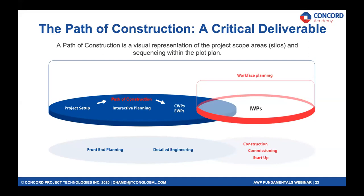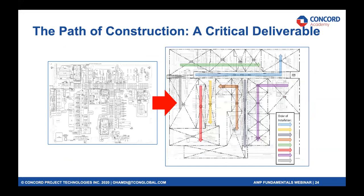The timing for defining this deliverable early on is in FEED. If you are a discipline or EPC contractor who got on board after the FEED package was complete, it's not too late as long as you haven't started detailed engineering. The bidding stage is also a good opportunity to develop a path of construction. Here is a visual of a component of the path of construction — its breakdown of areas where you take your plot plan, divide it into areas considering your logic of construction, and the order and sequence of installation.